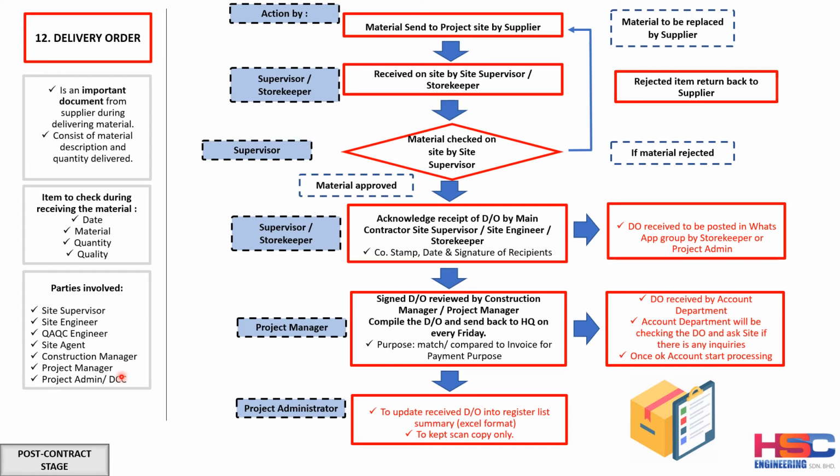For the checking, of course it will be by the site supervisor, but the sign off of the received DO will involve all the parties, because it is important that everyone on site knows what the material that arrives on site is.